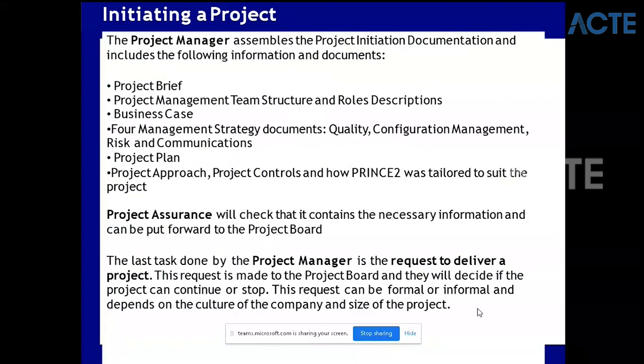The project manager assembles the Project Initiation Document, which includes: the project brief, the project management team structure and role descriptions, business case, and four management strategy documents - quality, configuration, risk, and communication - plus the project plan and project approach. Whatever we discussed, everything should be inside one document called the PID. Generally we don't write everything in the PID - we will put links to these documents, so you will have separate quality and configuration documents but links will be there in the PID.